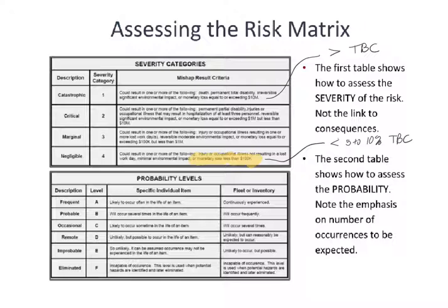So for instance, if you have a 6-month project and you have 30 people working for you, you should expect illness to occur multiple times during that time period. You should expect multiple people to be out on vacation or sick leave during that time period. It would be unrealistic to expect otherwise. So this gives you a bit of a scale in order to think about it.